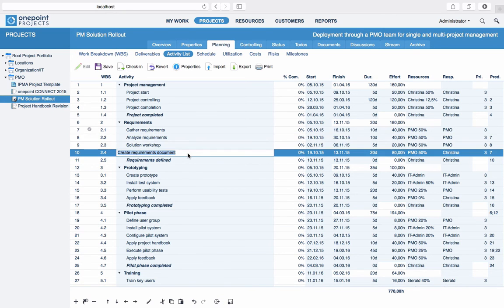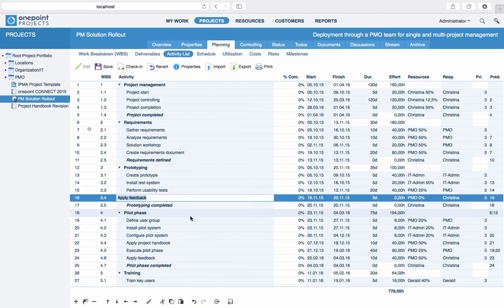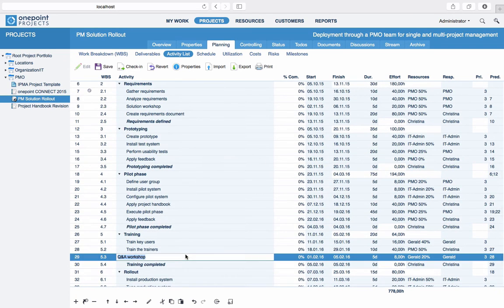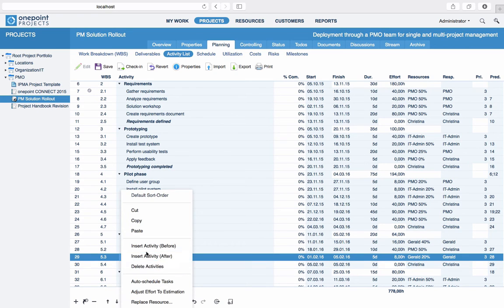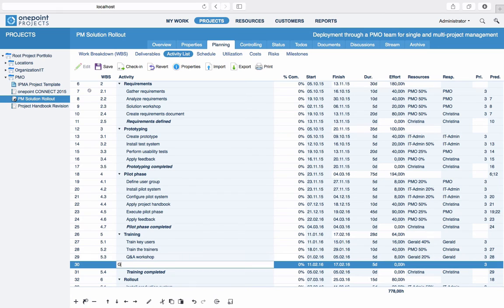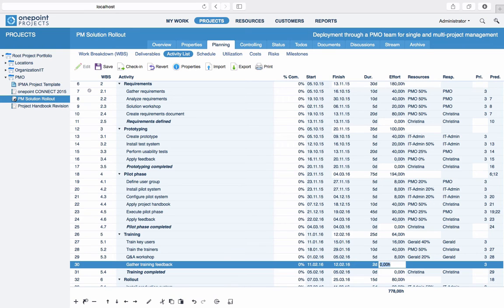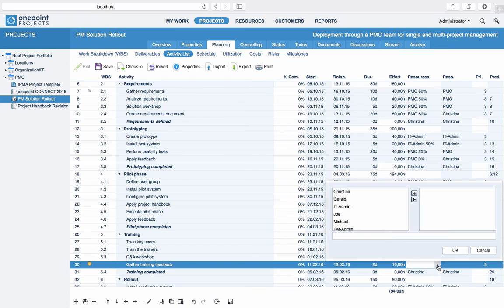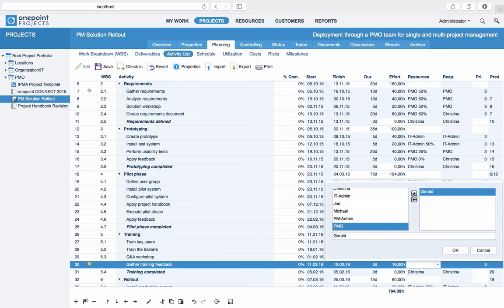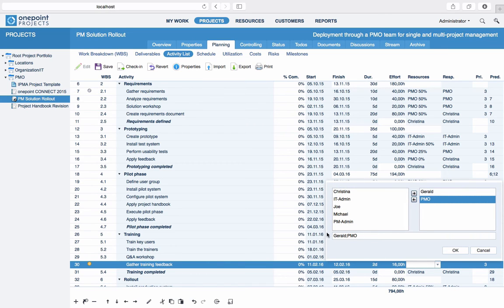All cells in the activity list that have a light blue background are directly editable. You can also easily navigate between cells using the tab key, just like in a spreadsheet. Typically, you will first want to enter the total planned effort of the activity in person hours or days. Next, assign the activity to one or more resources and thus distribute the effort between them. You can either use the resource chooser or you can directly type in resource names, separated by semicolons.